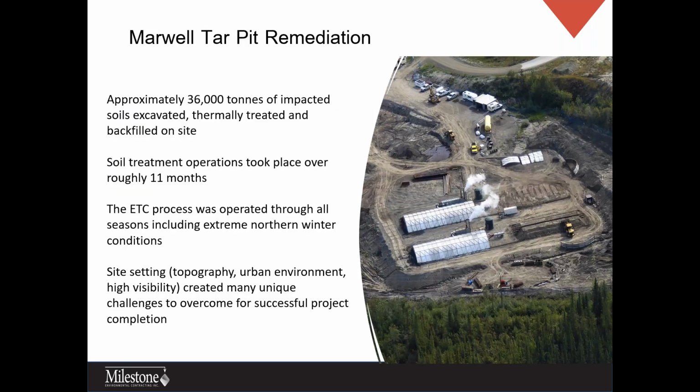So the Marvel project is another great example of utilizing on-site solutions to control costs from traditional remediation techniques. When we first arrived on this site, it had pooling tar on the surface, creating a huge liability and danger to the public. The project used a process of enhanced thermal conduction to treat about 36,000 tons of hydrocarbon impacted soils on site. This meant that the treated soil could then be used as backfill, so this reduced costs for transport, disposal, and obviously purchase of backfill.